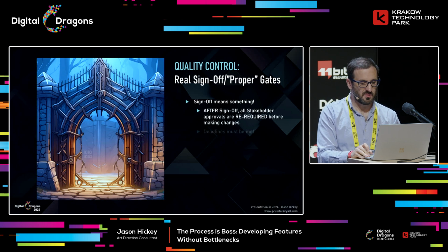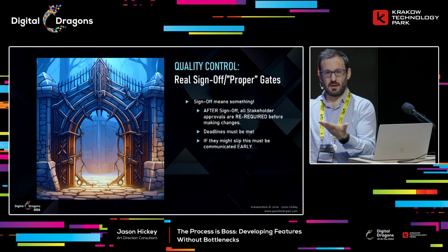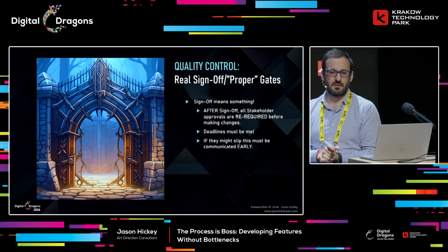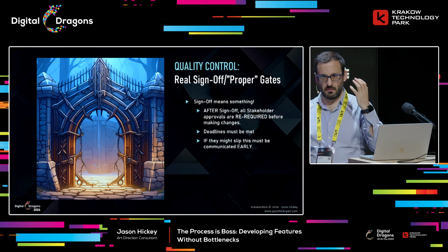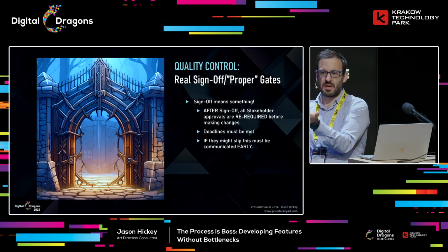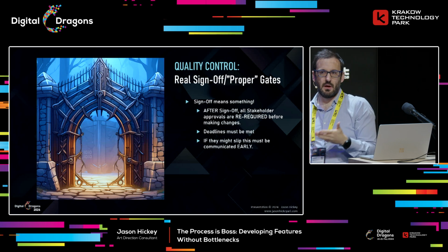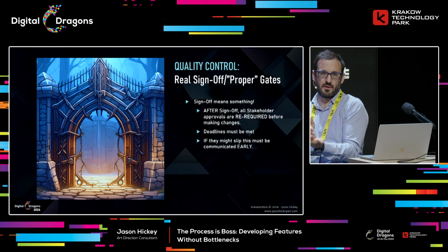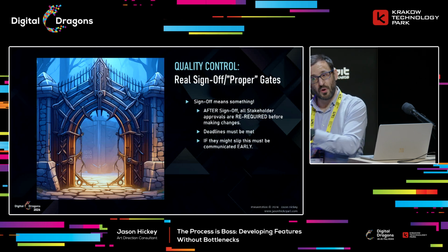So sign-off means something. What that means is that everyone says, that's it, no more changes. And of course, it's game dev, right? So loads of changes. But it just means that after that sign-off, you can't just make changes for the sake of it. You have to get a re-sign-off from everybody involved before you do the action.